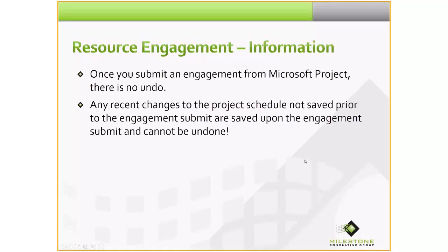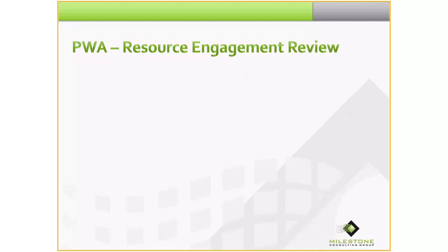Now imagine being a resource manager, okay? I'm sorry, I have a little bit of information here to cover first. I got ahead of myself. Once you submit an engagement from Microsoft Project, it's important to note that there is no undo. Any recent changes to the project schedule not saved prior to the engagement submit are saved upon the engagement submit and cannot be undone.